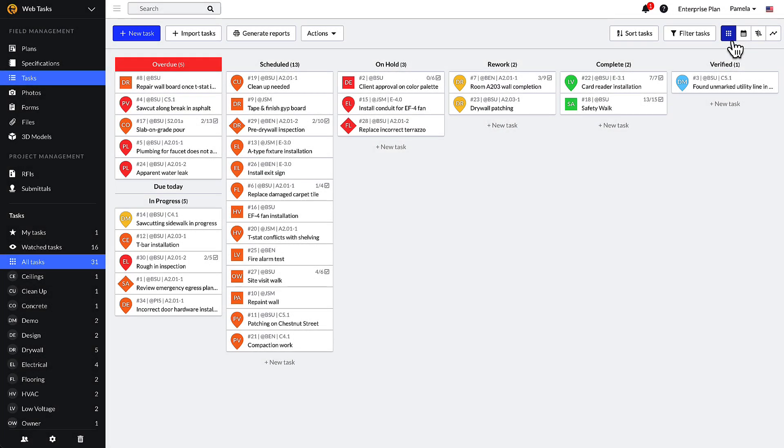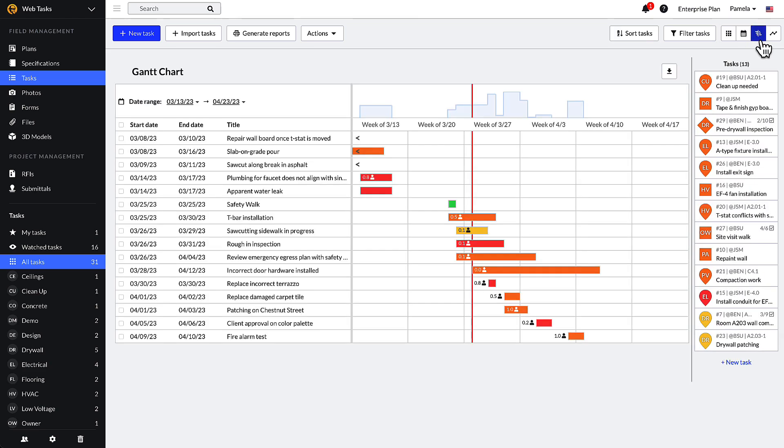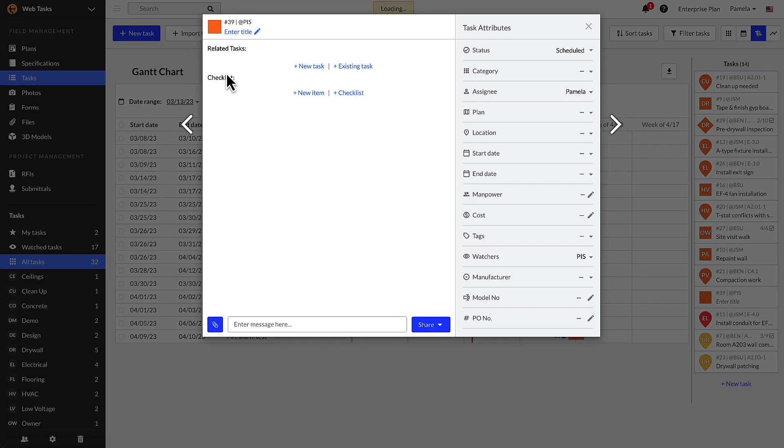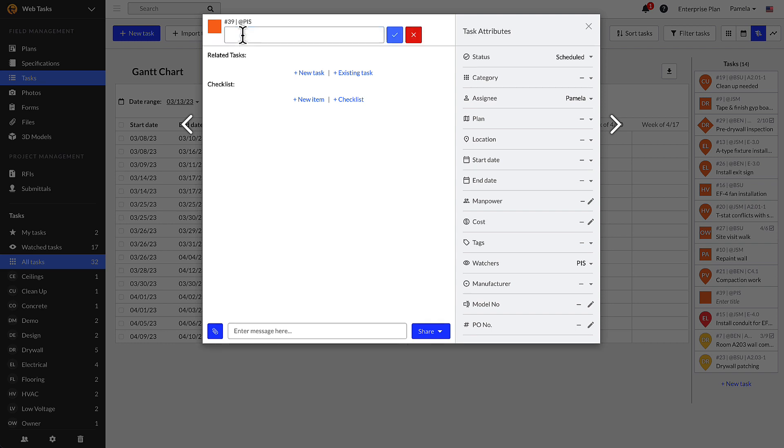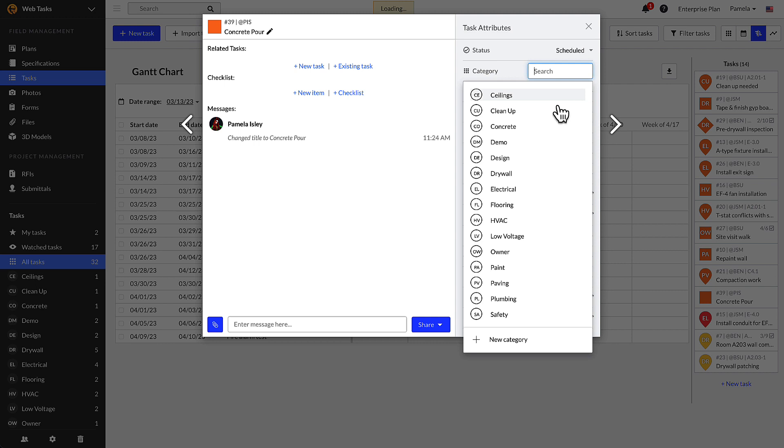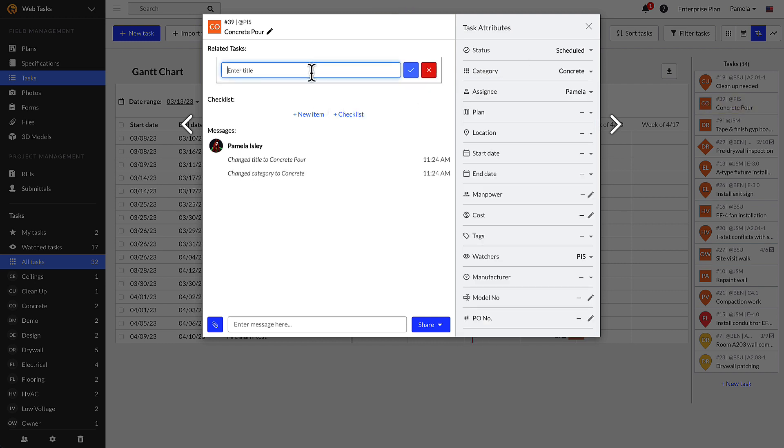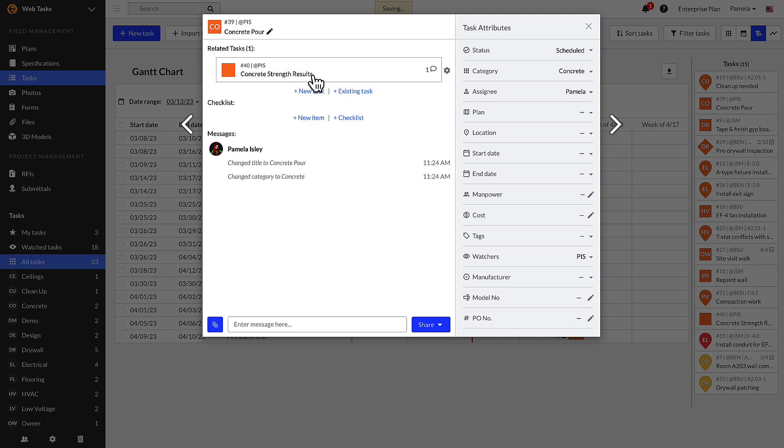Now let's review how to create a task from the tasks module in the Kanban, Calendar, or Gantt views. Simply click the blue plus new task button for the task window to pop up. Fill in the attributes as desired. You'll notice that Fieldwire presents the option of relating tasks within existing ones. Click plus new task under related tasks and give it a title. Click on that title and once again, insert the attributes as desired for the related task you just created.